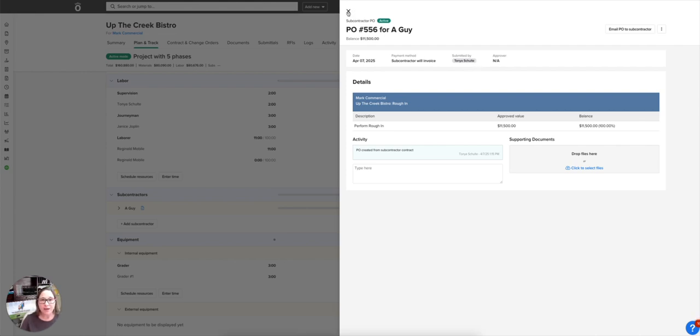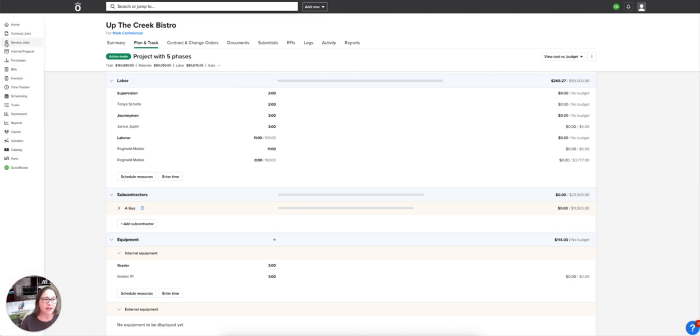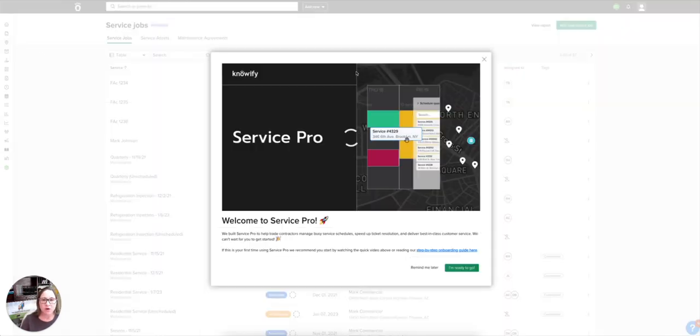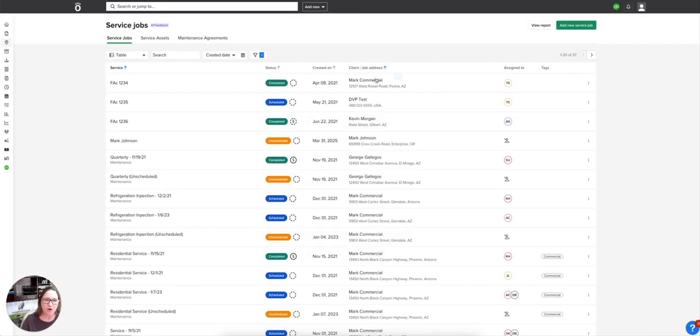As you know, we've been talking all the way through about the fact that Knowify can handle not just these long-term, larger projects, but we're able to also handle our service jobs here in Service Pro, which is built right into Knowify. And so the idea over here in service is going to be exactly the same. The scale might be just a little bit smaller, but the process is pretty much similar. You're going to record purchases and any other expenses directly within the service ticket. And that way you're going to ensure that every cost is captured and attributed correctly back to that ticket. So you can kind of keep an eye on what's happening on the service side, just like you would on the contract side.